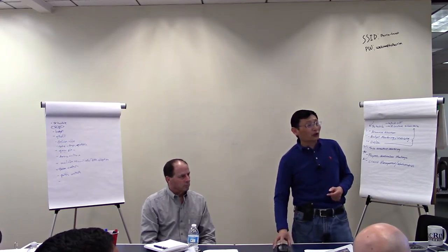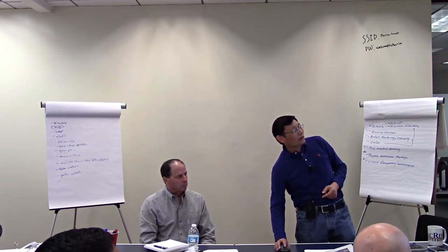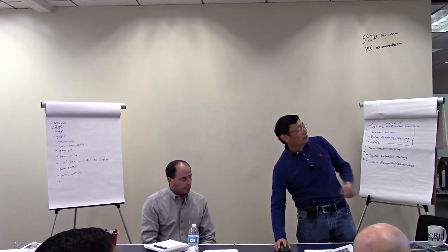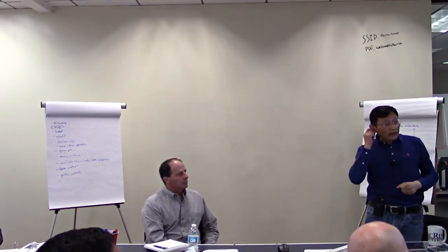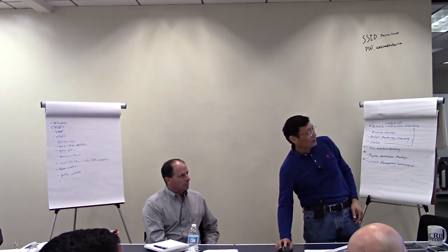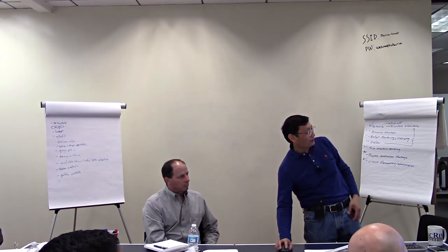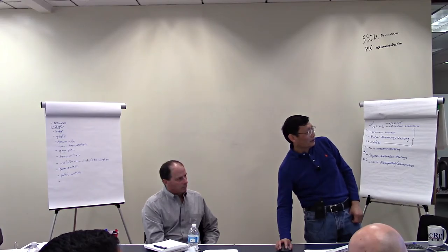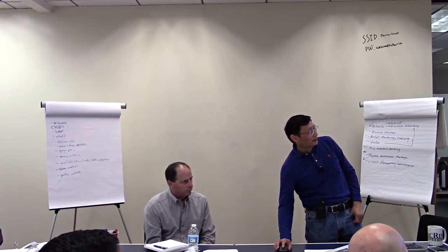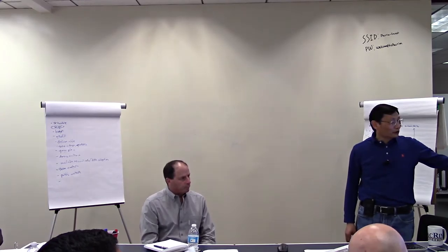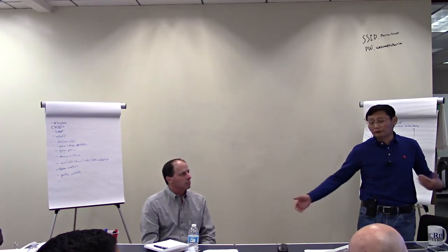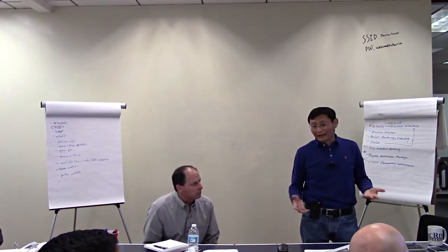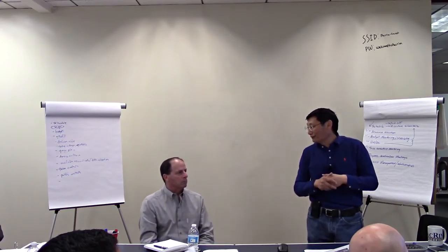In the schedule, because of that relationship, the critical path is what goes through the whole process. For the pieces that fall in the critical path, you need to pay closer attention, because that's going to really influence the overall duration. Another piece is the milestone. For example, kickoff is one of the markers we want to highlight. Submittals are one of the milestones, for example, here, whichever the submittal is.